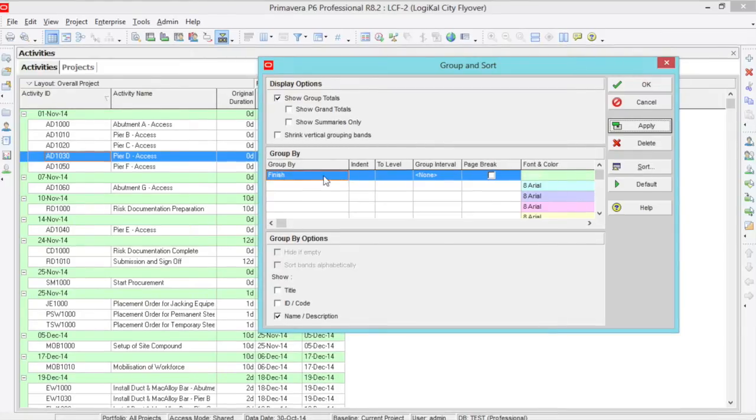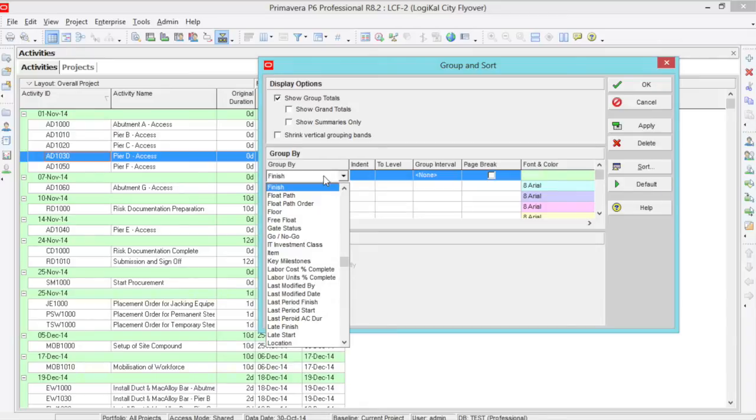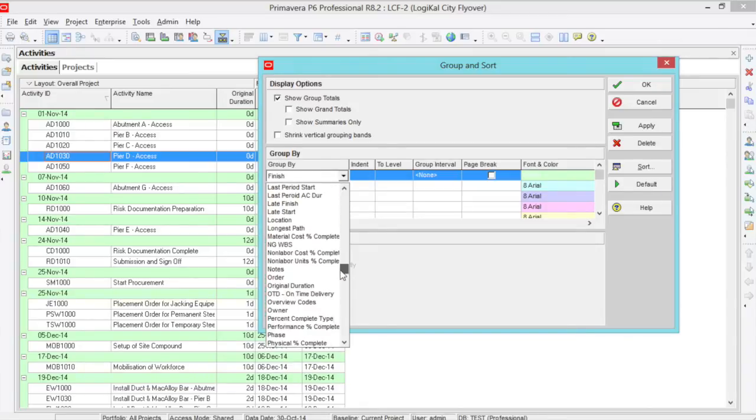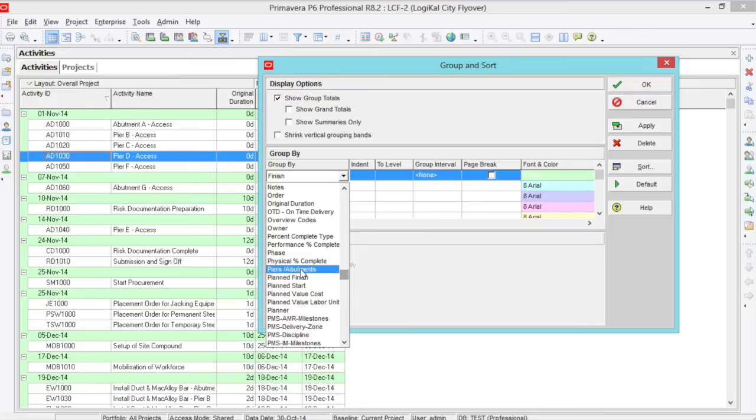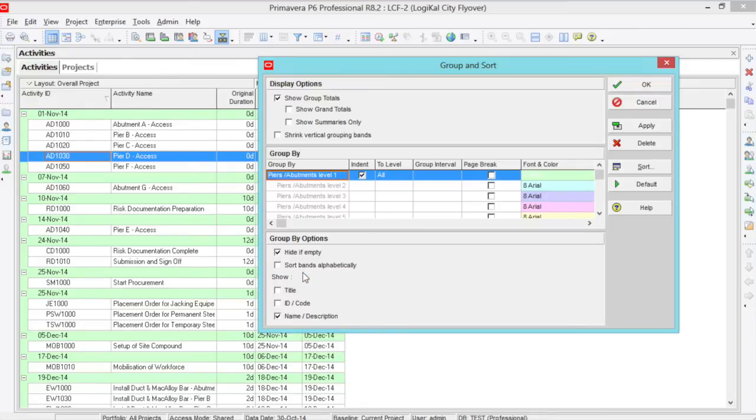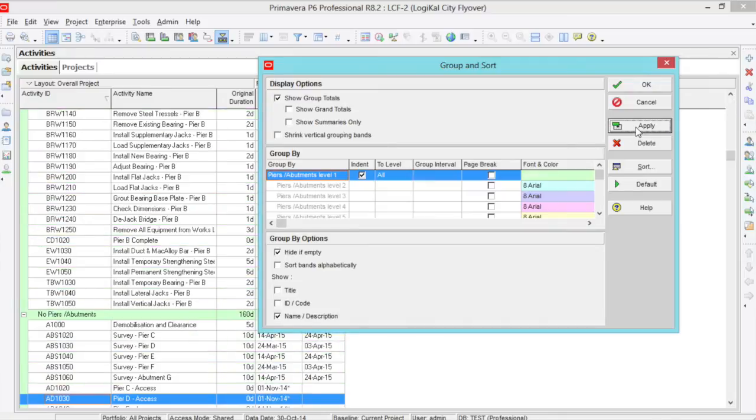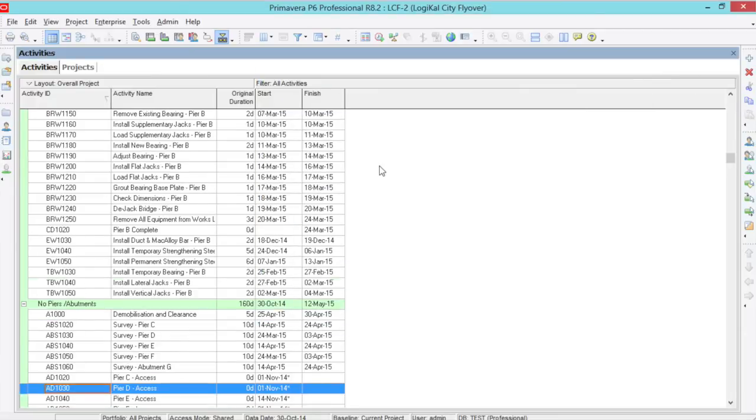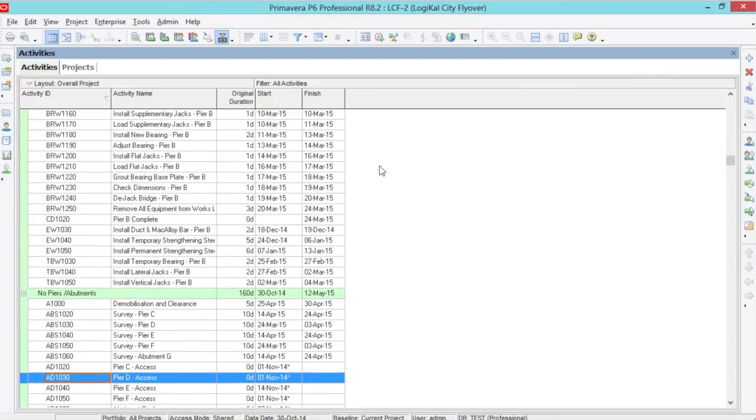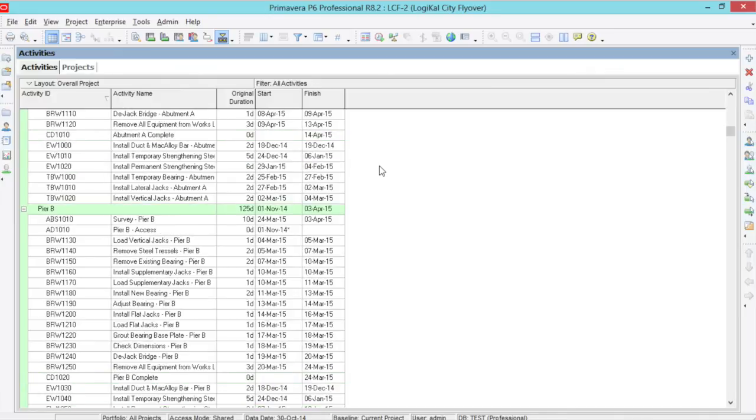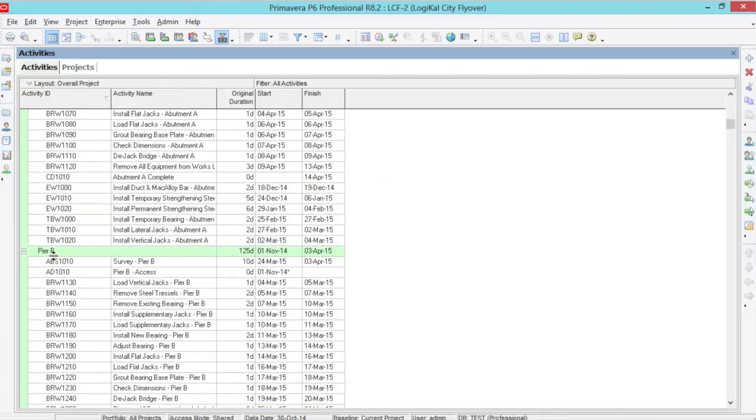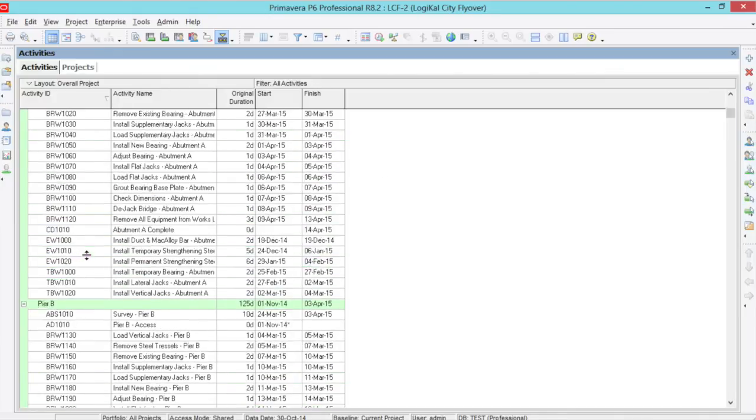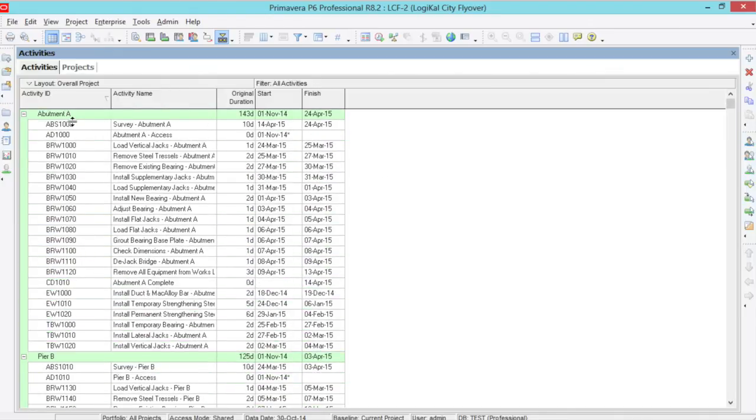Let's group by one more type, the activity codes. Look for an activity code that you have already set up. For me, I have piers and abutments set up. Here, once applied, I will have those which have no piers and abutments because I have not set an activity code to them. I will have some that have pier B and some that are abutment A. This is a neat tool to find all your activities in each category.